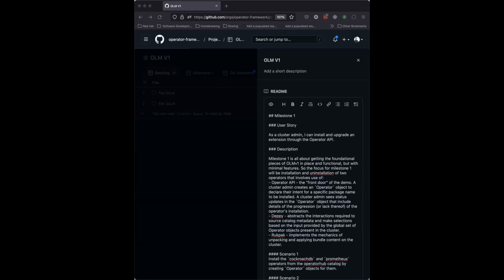We build a backlog that becomes kind of crusty over time. So I feel like having a really slim, well-focused backlog with a very strict set of one or two future milestones is probably the best way to make sure that we're always focused on the highest priority things that need to be done next for OLM V1. That's my two cents.